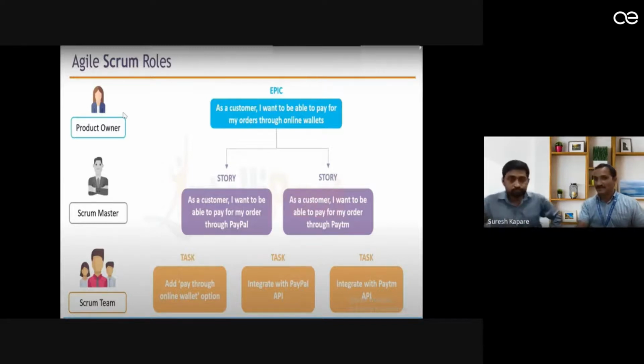So completing the task is the development. Yes, exactly. And when we are talking about stories and epics, that is something like a requirement. These are non-technical. But guys, please remember these epics, stories and tasks, because everything will be used in JIRA. In our project in ICAR, one statement which we got is your epic, and under that whatever subdivisions we have done will be the stories, with different structures like rover and WSN structure and analysis and everything. And to complete every story, whatever technical expertise we need will come under the tasks.